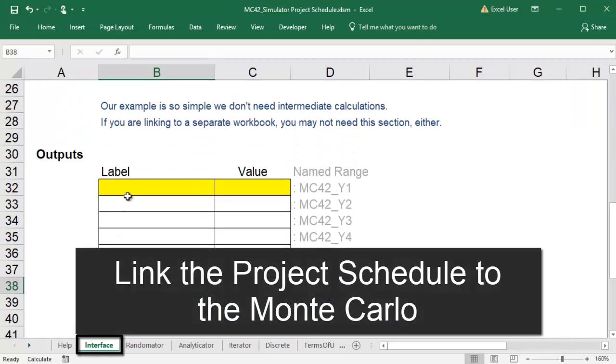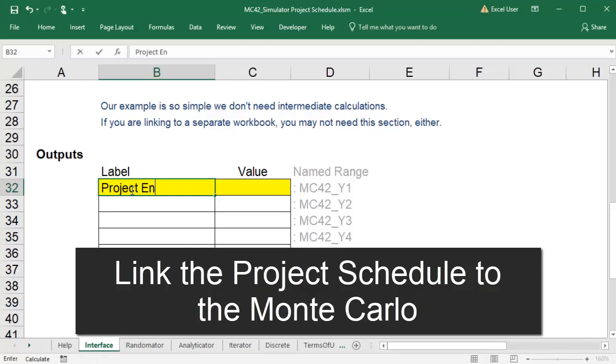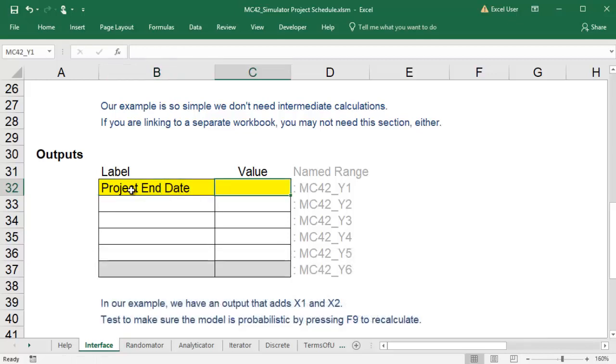I can link the workbooks on the interface tab of the Monte Carlo by specifying that the output is my project end date from my Gantt chart.